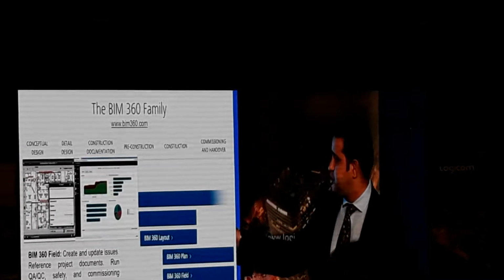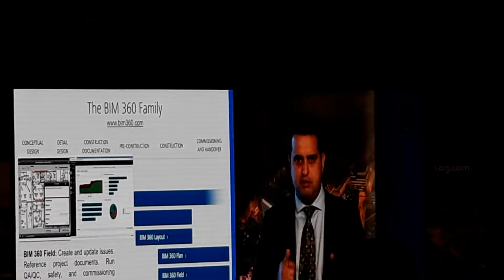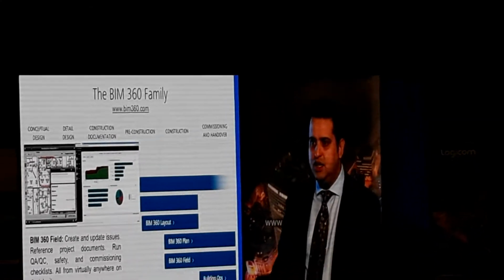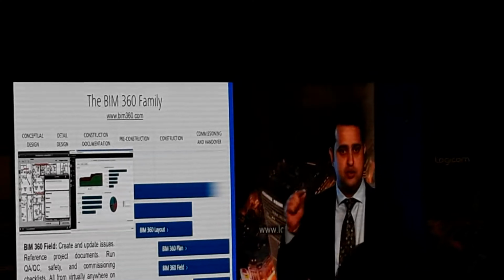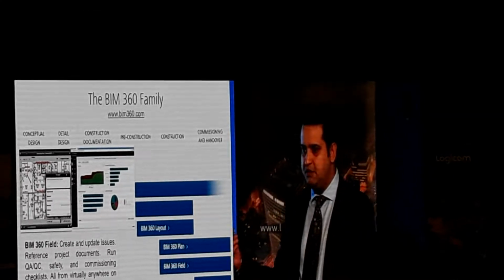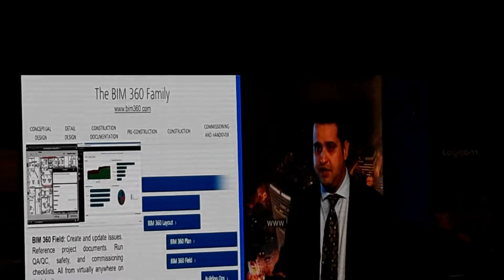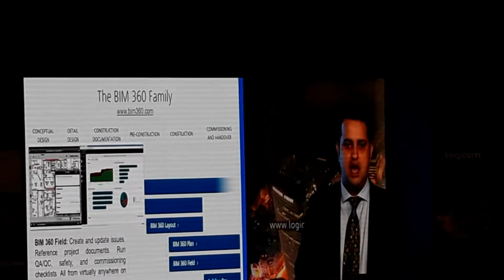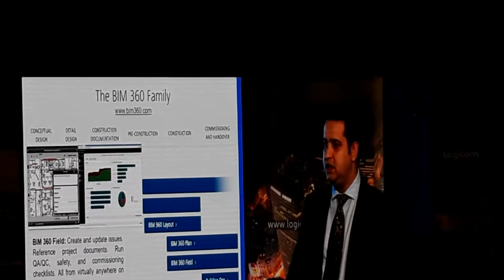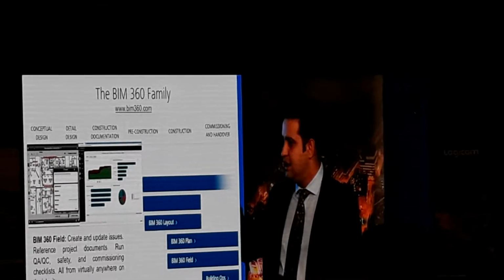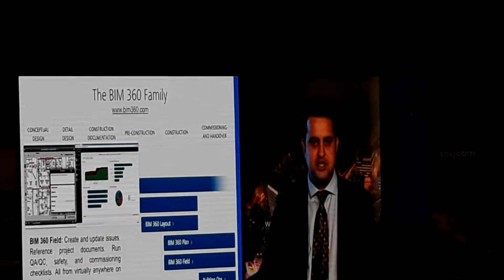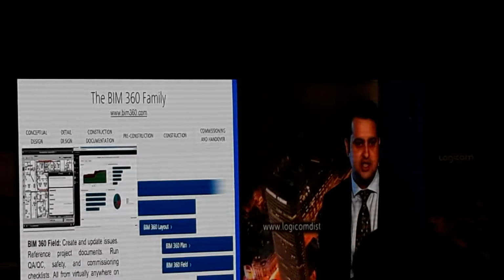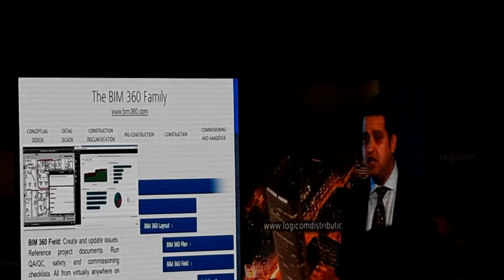What it allows you to do is once you have captured that information from a barcode, QR code or manually typed on an iPad, you can send it back to the location where it came from. Whether it comes from Navisworks, whether it comes from Revit. That means when you are looking to submit COBie or non-COBie as a handover package in LOD 500 to a client, this is it. So you just simply take all the data back to your authoring platform, your data is synchronized. You don't have to type manually any information.